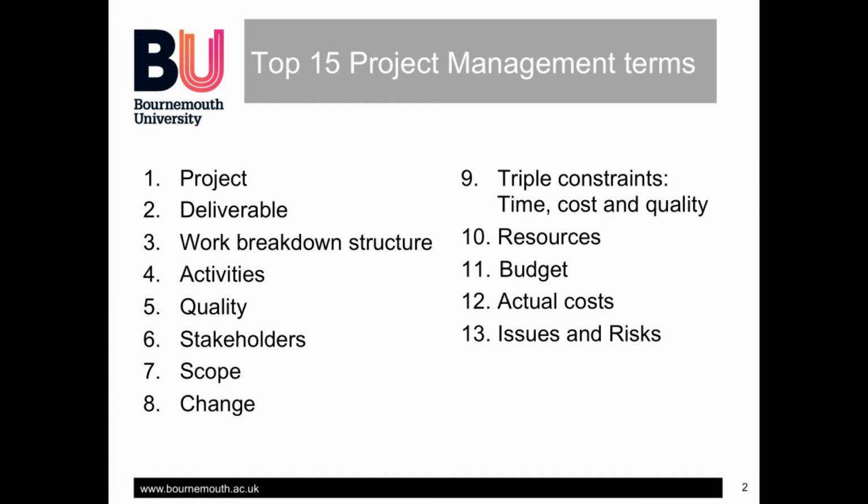While issues are happening now, events that might happen in the future and which could have a negative or positive impact on the project are called risks, and these also need to be logged. It is important to consider risk throughout the project because of the effect risk can have on projects, sometimes positively, but most often negatively. When considering risks, it's a good idea to assess how likely the risk is to happen, and if it does, what the impact would be. This technique allows you to focus your attention on the most important risks in your project and to have a plan in case they occur.